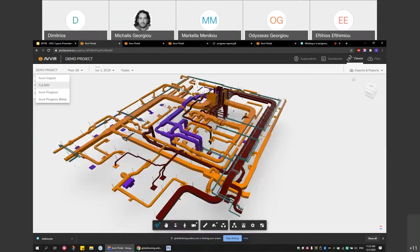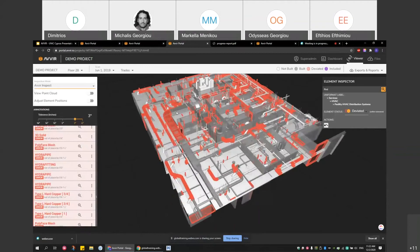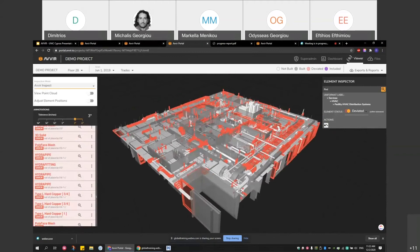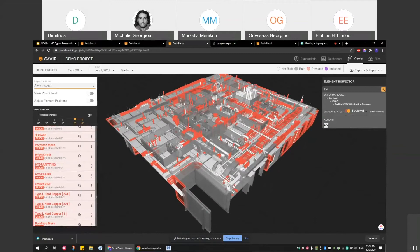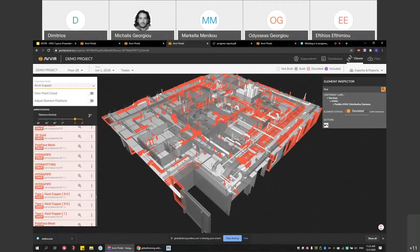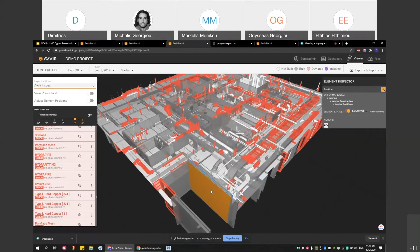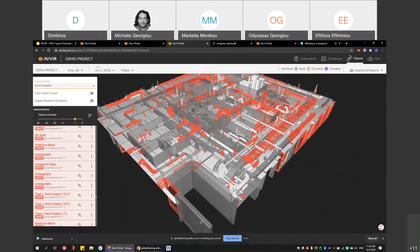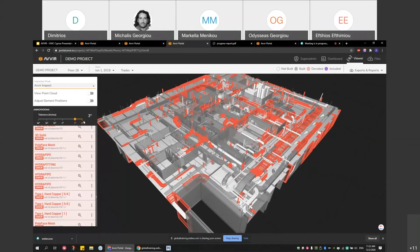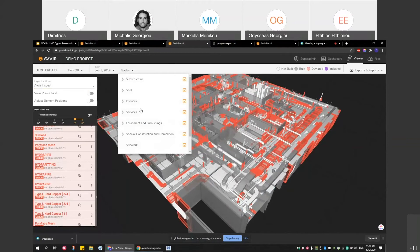Things get even more interesting when you go to AVIR Inspect mode. The color scheme is more simplified here. We only have white elements and red elements, transparent and non-transparent. What is non-transparent is considered to be not built, and what is transparent is considered to be built. The elements you see as red are the elements that the algorithm is picking up to be deviated.